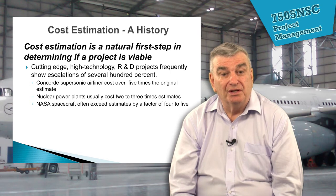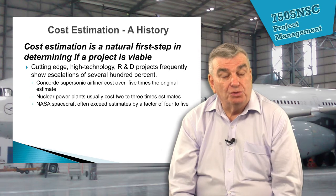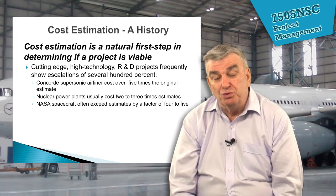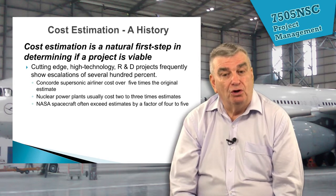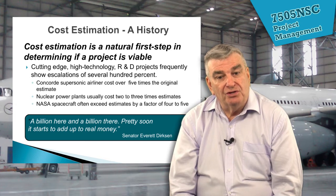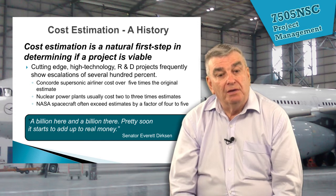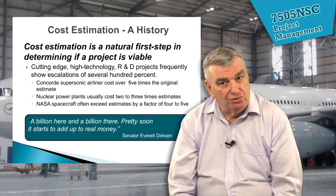Concorde cost over five times the original estimate. Nuclear power plants usually cost two to three times estimates — and nuclear power plants are now part of aerospace technology. NASA spacecraft often exceed estimates by a factor of four to five. We know from both the Airbus A380 and the Boeing 787 that there were huge cost overruns because they encountered problems they just didn't expect. As Senator Everett Dirksen said at a US Senate Estimates hearing: 'A billion here, a billion there — pretty soon it starts to add up to real money.' Tongue in cheek, but it's true on projects.